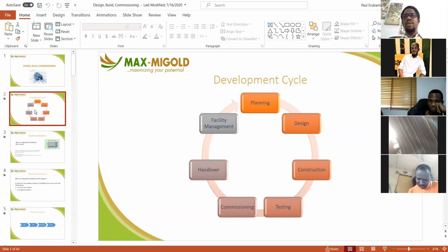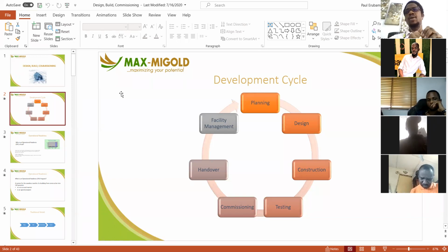So the design and the bill of quantities go into the contract, and those three now come together to be used by the construction team to produce construction drawings with which the actual construction work will be done. So the work is now ongoing. But while construction is ongoing, certain documentation is also supposed to be generated. For example, if there are variations, because of course every construction will have some form of variation, minor or major, in different aspects of the construction. Documentation of the history, of the activities and the processes that go into that construction needs to take place, including variations and how those variations comply with the requirements of the construction contract that is being built, right? So that is ongoing at that time.